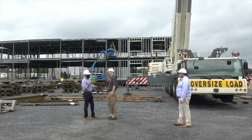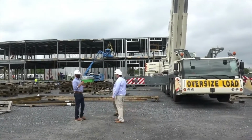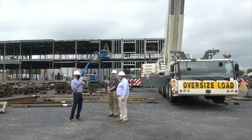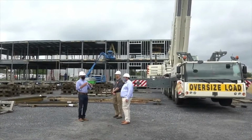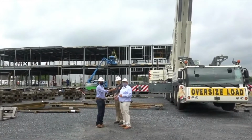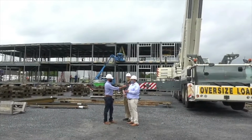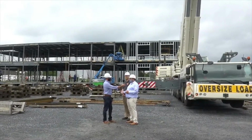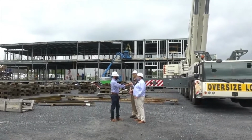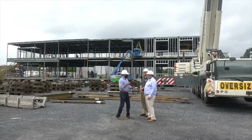Right. And I know, Casey, you can come back over here in the picture too. So with this, tell me a little bit about your process with the trades. Is there a pre-construction meeting, sitting down in your office, going through every little detail with all the trades at one time? Yeah, there is a pre-construction meeting. It's to go over their scope of work, where they're going to start and stop, and what pieces are going to be left out for ship loose, for site install. And then, if it's a project like this, some of the trades might actually follow it to site and complete it on site.